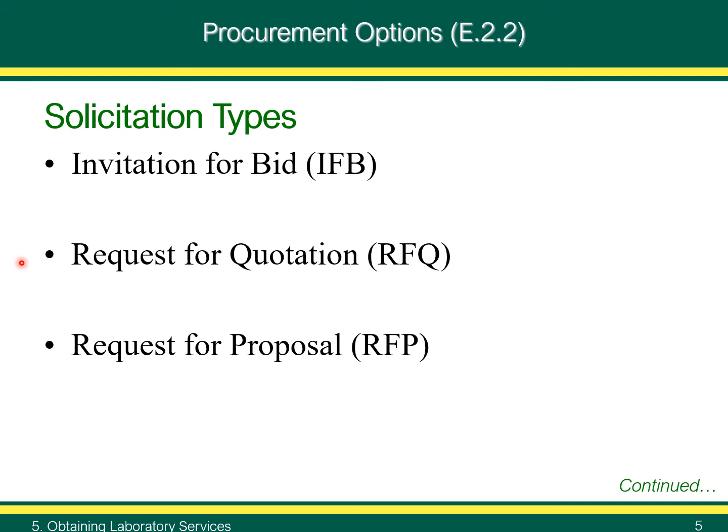Federal government POs are limited to the SAT of $250,000, although the maximum size of purchase orders may be limited by the organization. Purchase orders between $10,001 and $250,000 are automatically set aside for small businesses unless a justification to the contrary can be made.